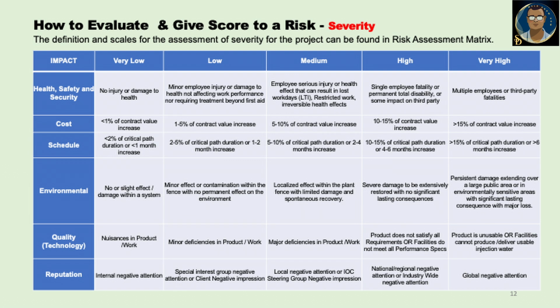High is the project does not satisfy all requirements or facilities or does not meet the performance spec, meaning the requirement of the client. And then very high is the product is unusable. Not conforming is a different thing, and you cannot use the project. So this is very high risk. So the product is unusable or facilities cannot produce or deliver usable injection water. Our project is a water injection project, so we write it here, water injection.